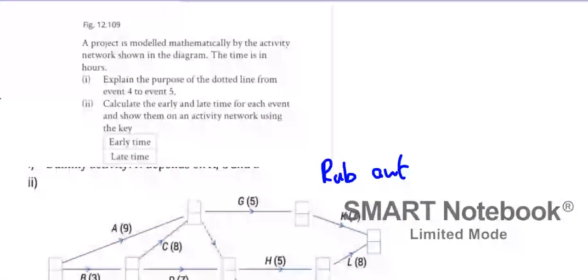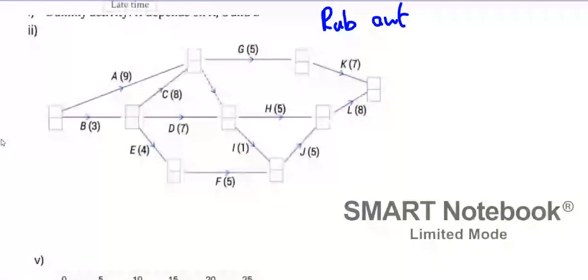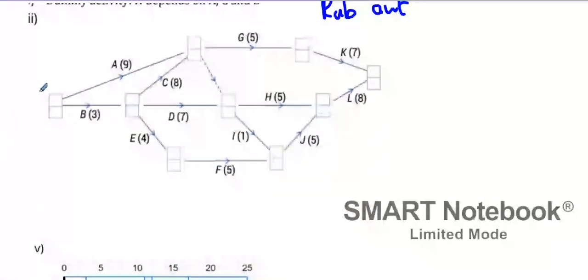Next, the top is early times and the bottom is late times, and we're given an updated tree. Now, what do we think about the starting one? That has to be 0, doesn't it? 0 plus 9. So it's big top or small bottom. So we can either have a 9 on top or we can have an 11. Which one is it? 11. There's 11 right there. Okay.